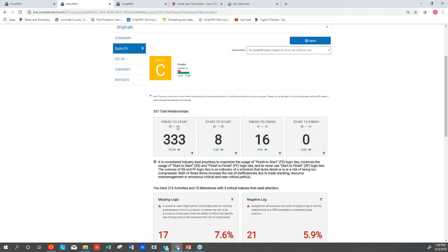Most of the time people believe that most schedules should be filled with finish to start ties as opposed to start to start or finish to finish ties. That's at least what the DCMA methodology tells us. DCMA stands for Defense Contractors Management Association. They have written a paper which most of the industry has embraced on 14 or 15 points that we need to be looking at and assessing to gauge overall quality of a schedule.